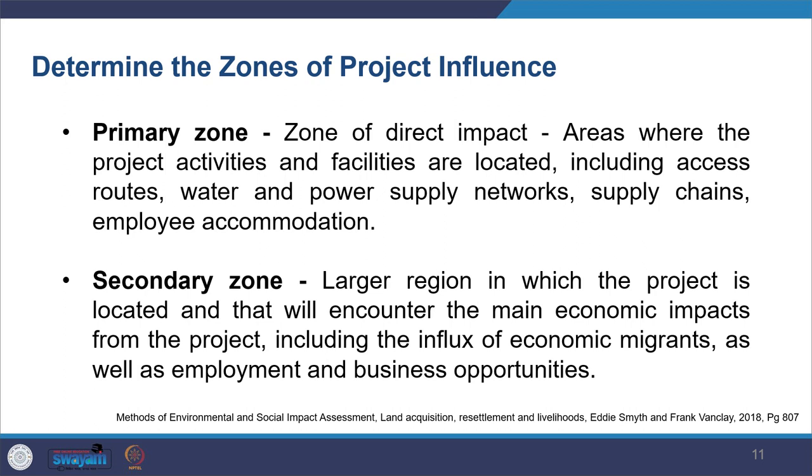Then there is the secondary zone, which is the larger region in which the project is located and which will have economic impact because of the kind of activity you're doing in your project area. Because of the development which is happening, you might have other economic migrants coming to the place. They might get more and more opportunities, so they might be coming to that place. And then there might be increased opportunity for business, so it might also attract other business communities to move to that particular place. So you also need to identify those zones, and that would be the secondary zone. You need to identify those kinds of zones in your steps for scoping for land acquisition and resettlement purposes.